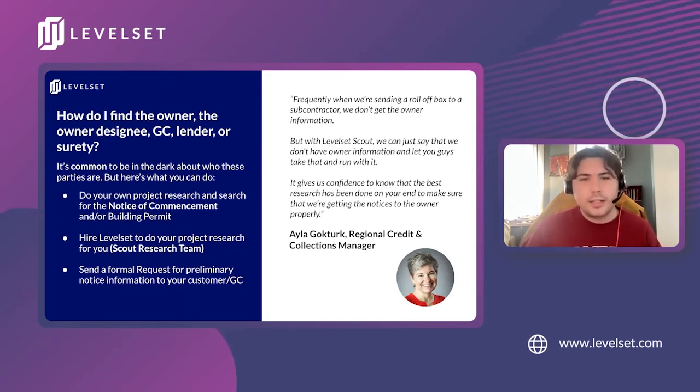In some states, finding the property owner may be as simple as searching a county assessor's website or going into the county index. However, California doesn't provide property owner information online, so you often have to make a phone call. But on the flip side of that, Orange County and Fresno County won't give out information over the phone specifically. Many other counties will, but it just depends, and this creates some roadblocks for getting through to this information.